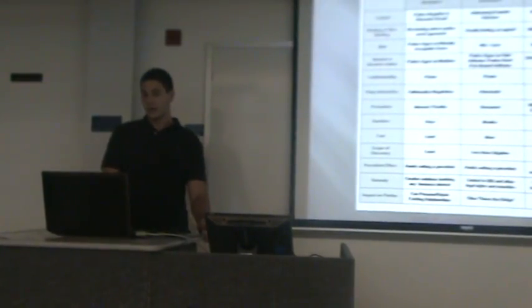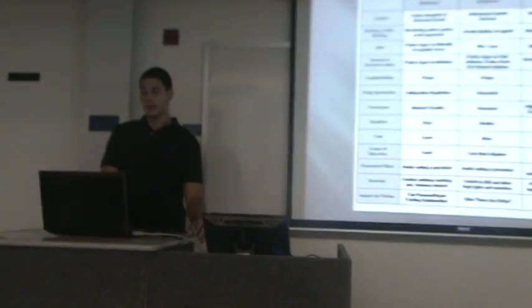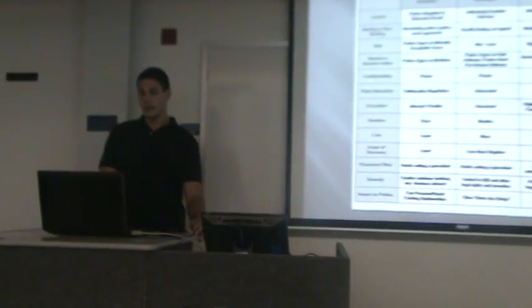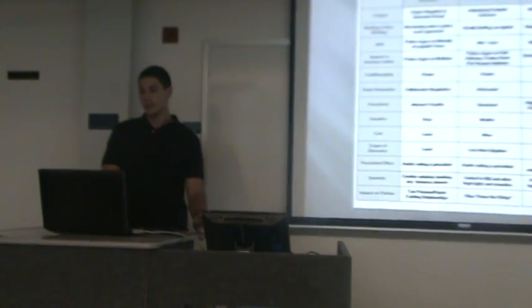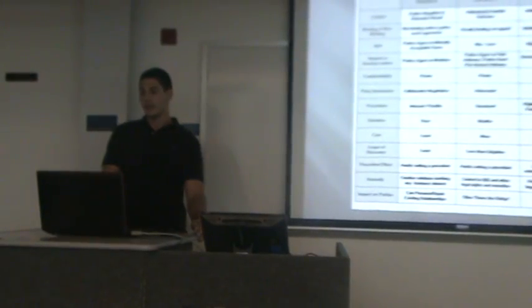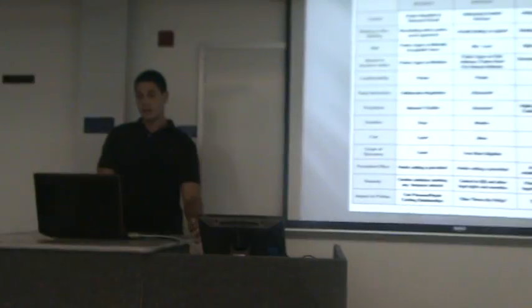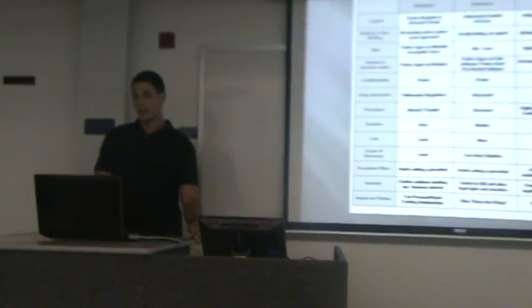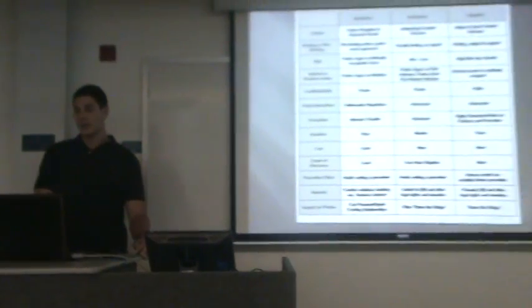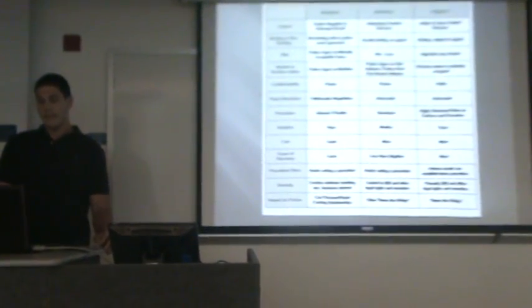Now, the most important differences are cost and duration. Mediation can take days, arbitration takes months, and litigation can take years to solve a dispute. While the cost also shows that mediation is the least, arbitration is more, and then the most is litigation.